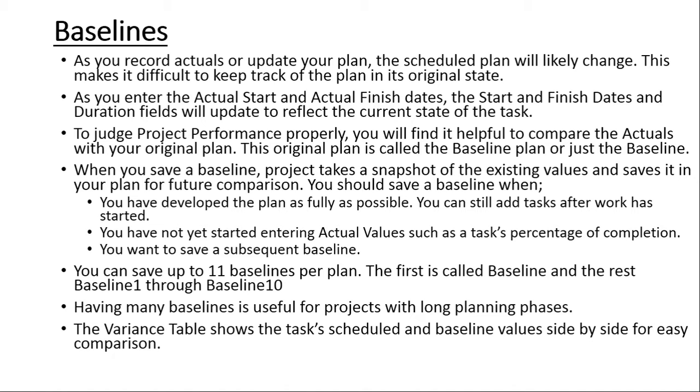Also, you can save a baseline if you are intending to save other baselines after that. This is because in MS Project, it allows you to save up to 11 baselines per project plan. So the first one will simply be called baseline, and then from then onwards, you've got baseline 1 up to baseline 10. Having many baselines is useful, especially for projects with long planning phases, because at times you develop your